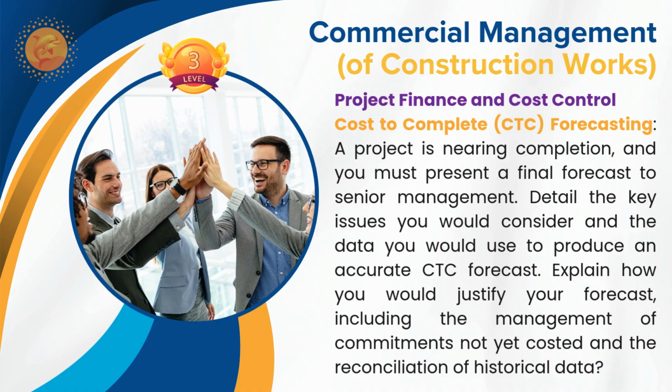Up to a particular cutoff date, I have to consider the cost incurred in the project based on my historical data for that cutoff date. Then also beyond this cutoff date, how much balance work is there? I will get the quantities from the quantity surveyor, and balance work I will accordingly